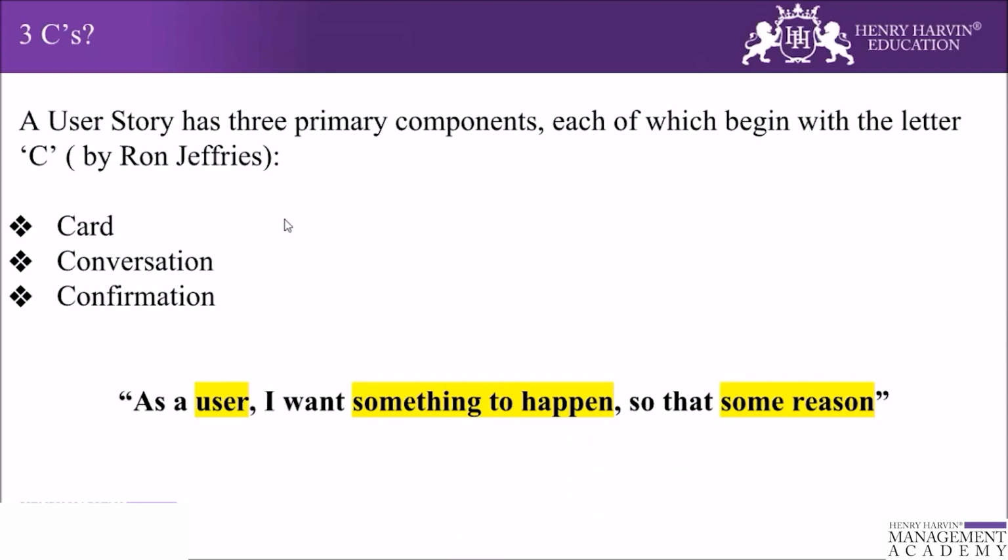Generally, there is a specific size of the card. It should not be more than certain inches, 3 or 4 inches, so that there is only ample space in which you can write a single sentence rather than describing the complete detail about the user story. For example: as a salesperson, I want to enter into the application so that I can order my favorite food. So this is the way to write the user story.